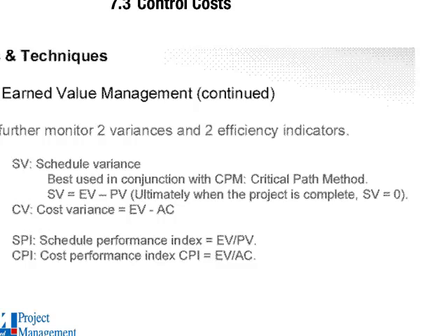Your earned value minus your actual cost is your cost variance, right? So if you get cost variance, which one indicates a cost overrun? Negative. Why?